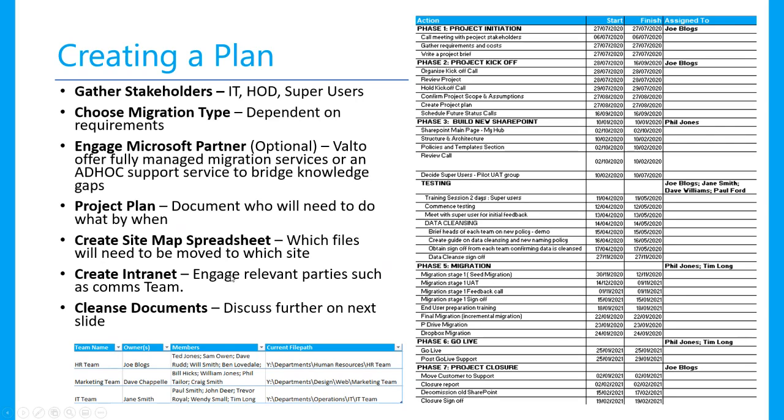I've seen it before where people have chosen not to do this. They've not wanted to have just one folder that moves into their team, and they've provided a spreadsheet which has 10 folders that need to go into that one team. However, the more file paths you have, the higher the risk that something is going to go wrong. Either there's a folder that's been missed, or someone's not put a file inside of that folder, or when it comes around to using your migration tool, the more file paths you have to migrate, technically, the higher the odds that one of those could fail, and then you've got an issue to try and resolve.